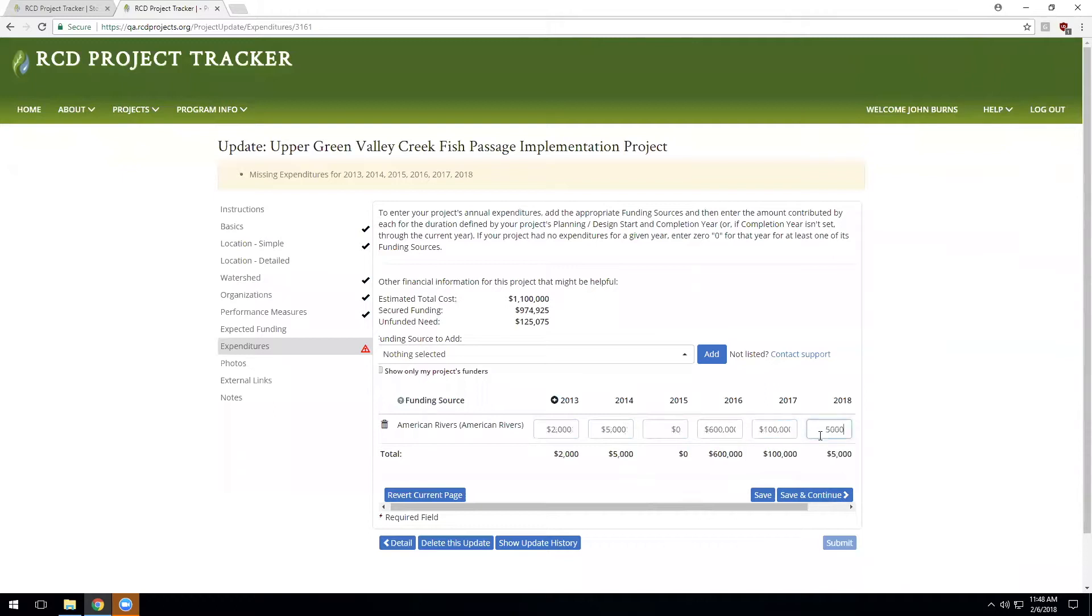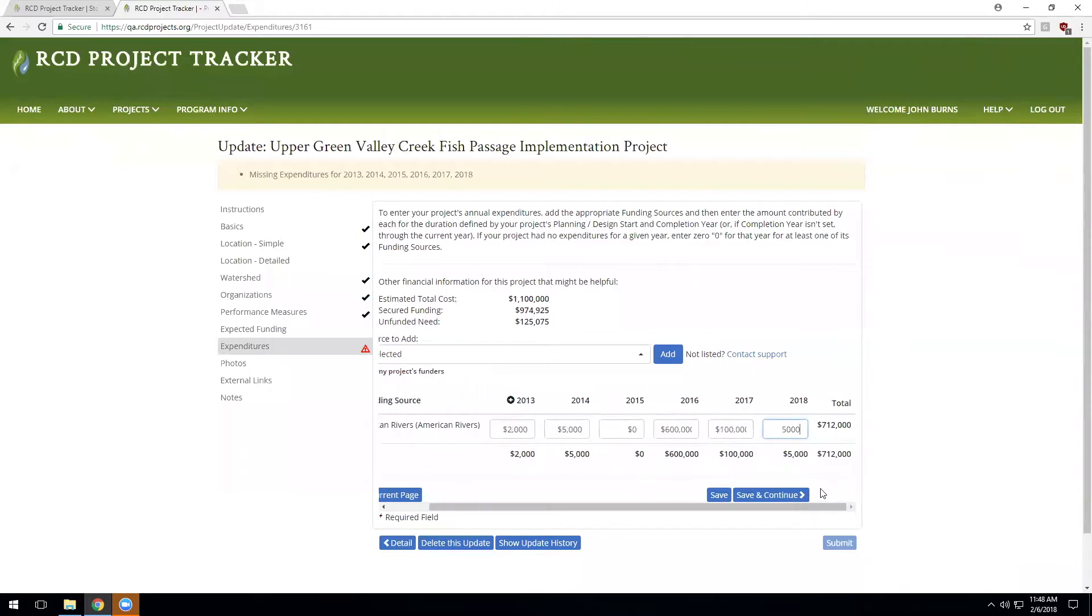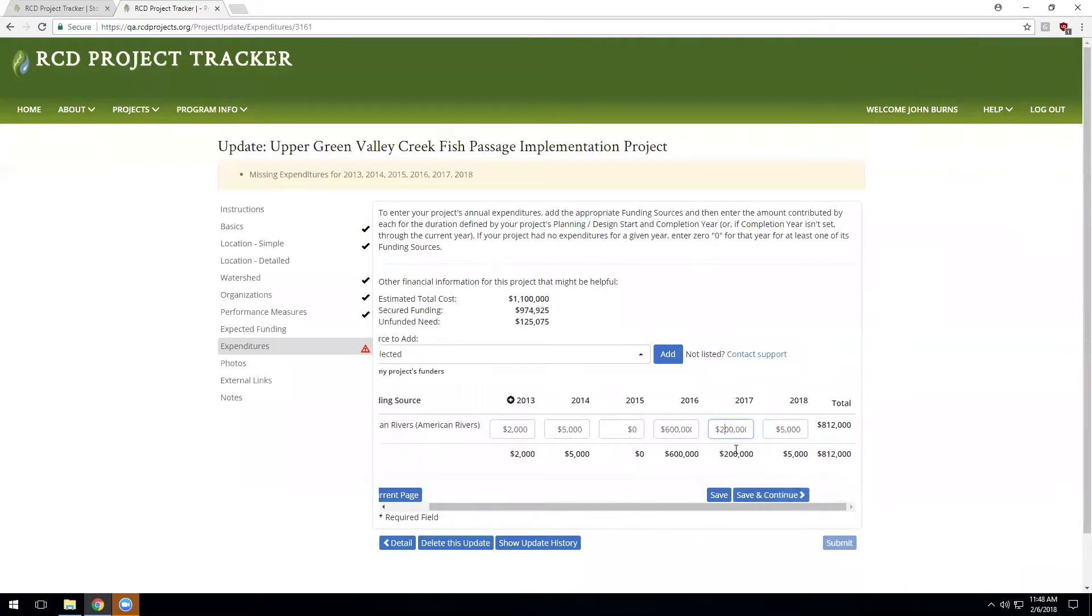Once we have a complete set of data entered, we can see the total. You'll generally want the total expenditures to match the estimated total cost for the project, particularly as the project moves into the completion phase. You would expect the record to be complete and reconciled, but for this example we'll simply move on.